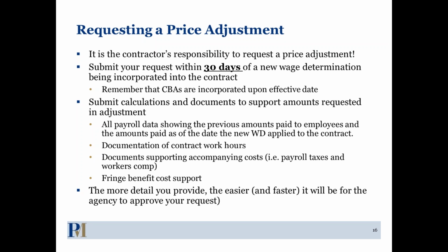You need to submit calculations and documents to support what you request. So you need payroll data. And often what you're looking at, say in the SCA context, say you have a 20 or 30 cent difference in an hour, you look back at the last year to determine how many hours were worked, et cetera. That's how you determine what your cost is going to be in the next year based on the difference. So if you had 40 cents an hour, let's take the example from the last slide.